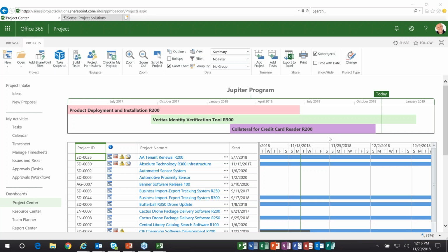Roy asked, what about baseline information in the master? The baseline information, Roy, is stored in each sub project, so you don't need to baseline the master. However, if the master project will include some additional tasks that go beyond just the sub-projects, then you will want to baseline. I'm assuming that's a saved master project, so at that point you would want to save a baseline.